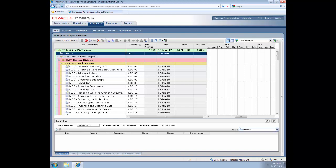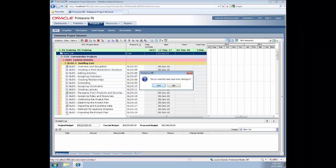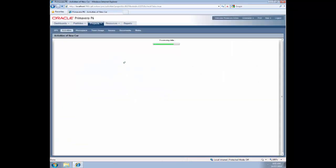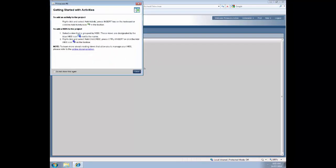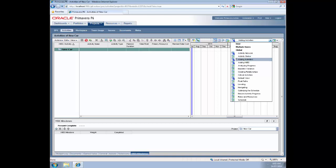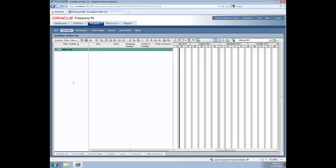So we have an empty folder and we now need to work on the detail. We'll come to the activities window, which is one of the sub-menus here. Click on that - if you want to save view or changes, we'll say yes to that one. It is possible to use this little wizard to start with the activities, but we'll say don't show this again and close it. We need to build the WBS. These are controlled through the view selector, top right. We get the drop-down, look at the available views - one of them is called 'adding work breakdown structure', so that's the one we want. We're now ready to add in our WBS.